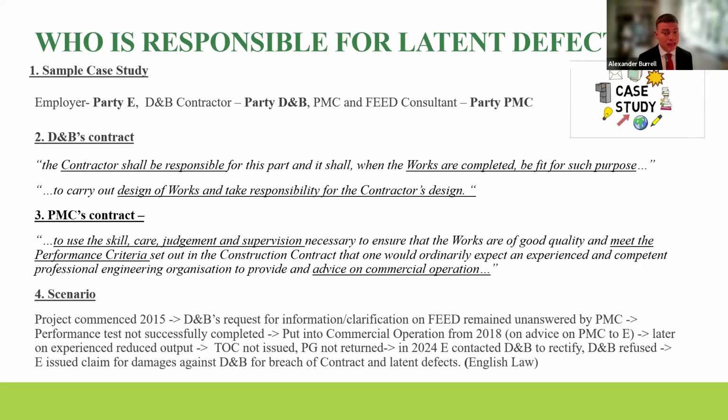The contractual claim against PMC would be a breach of their obligation to use care and skill to meet the performance criteria and/or to advise as necessary. This is a substantively different contractual obligation. It's not a requirement of the plant or the project being fit for purpose as such, but to exercise what would be their standard of care as a professional. In fact, it largely mirrors what their professional obligation would be in any case: to exercise the care and skill of an architect or an engineer, in this case, to the employer. So you'd have to find something that would demonstrate that the standard of care fell below that of an experienced and competent engineer.